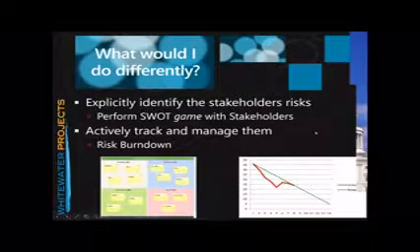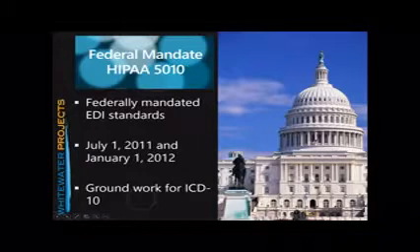All right. Next, this was a federally mandated project. We were doing the updates to HIPAA 5010. Federally mandated EDI standards had a go-live date of January 1st, 2012. If we didn't hit that go-live date, guess what? We were charged $1. We were fined $1 per member, right?